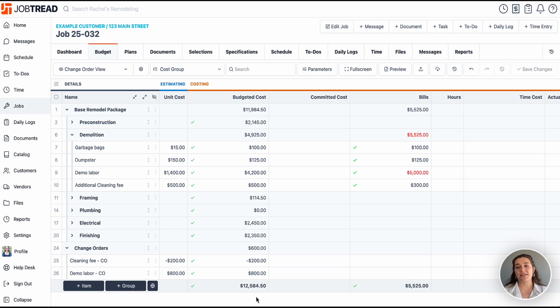The advantage of doing it this way, instead of changing that budgeted amount, is that you can see a group of all the items where you went under and over budget and where there were unexpected costs. This can be useful if you're looking across jobs to see if you're consistently losing or gaining money in a certain place and need to adjust how you're doing your estimates. Both ways work, and I encourage you to decide which way makes more sense for your organization.